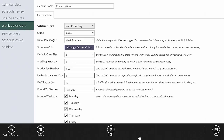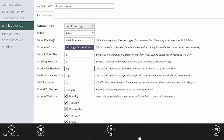If you don't estimate drive time to or from the job as part of the estimate, you need to build in unproductive hours so your schedule doesn't get out of whack. For example, you might have seven and a half productive or estimated hours per day, then add an hour and a half of unproductive time every day to account for loading, driving, and setup. If you estimate all your payroll hours to your jobs, you don't need any unproductive time. If you don't estimate your entire payroll hours to each job each day, you need to set some unproductive time.